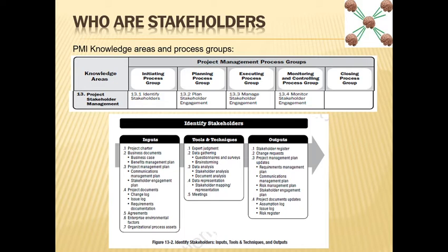I mean, if there is some big risk and that risk is triggered, then that risk can make some problems. Otherwise, this project should go very fine. But what generally happens is that these three questions are not asked at the start. They are generally asked at a much later time when some things are already done. So then either you need to do a lot of changes, or you need to live with it, or you just deliver the project with some stakeholders not happy. So you cannot easily call it either a failure or a success.